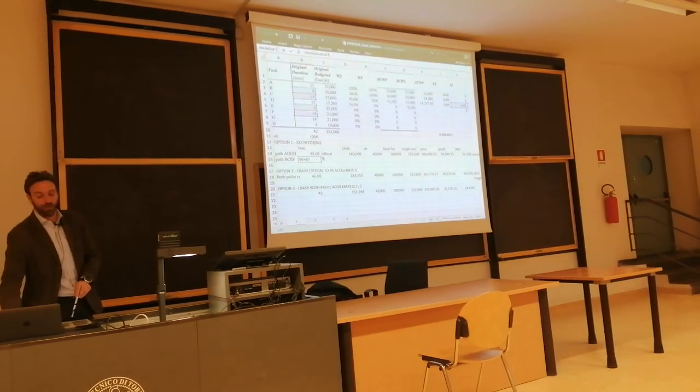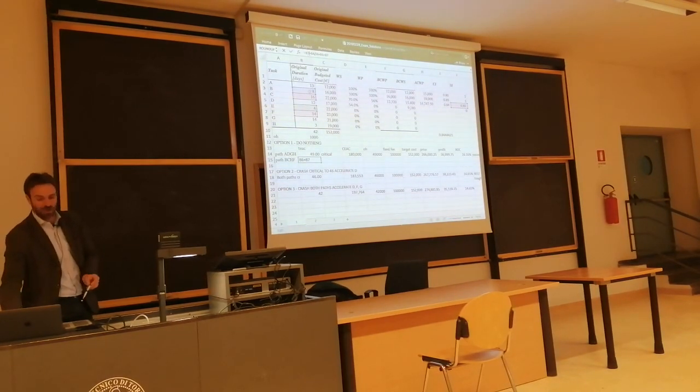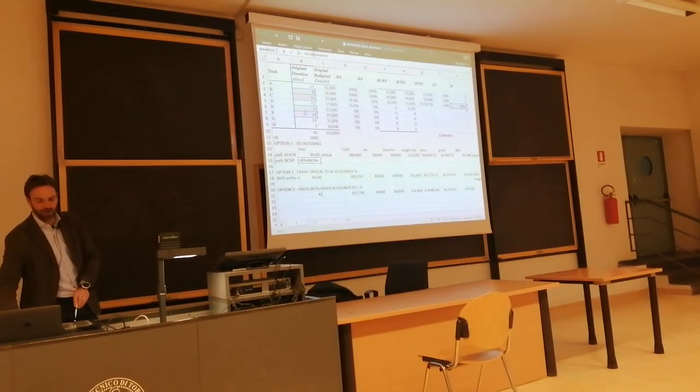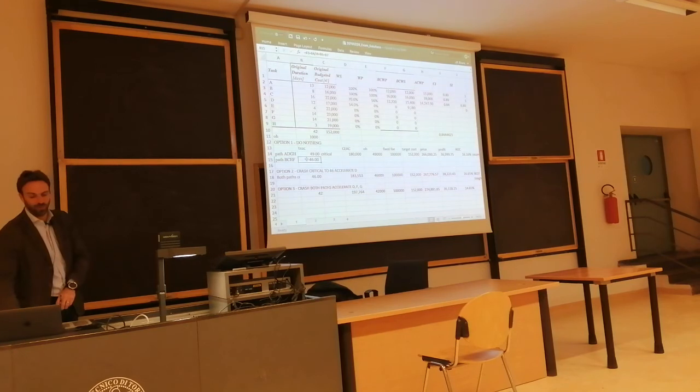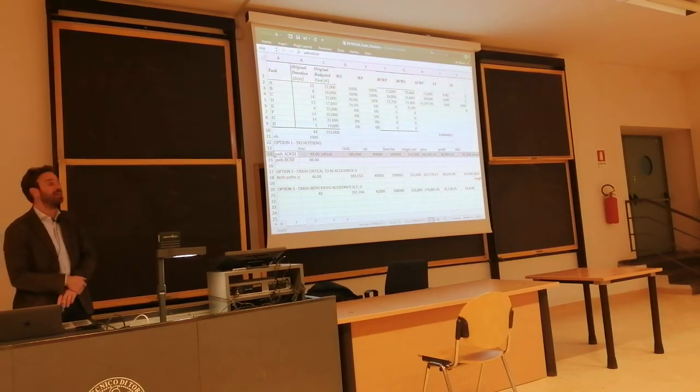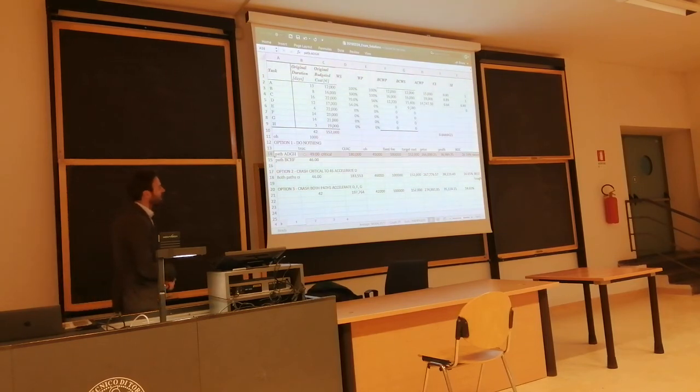So I'm assuming that the project was starting later, and I would say duration of B plus duration of C divided by 0.8, which is the schedule index, because we're experiencing delay on this task, plus original duration of future E and F, which leads to 46. So now it looks like that if we do nothing here, the path that will become critical is ADGH, with